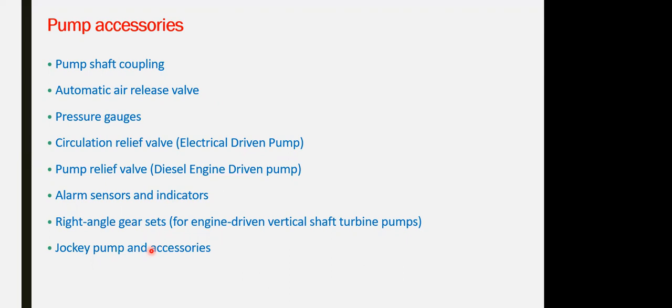All of the tests for this equipment should be submitted when you are uploading for the inspection of civil defense, not as part of the design DC2 submission. It is part of your as-built submission for the civil defense. You have to maintain a copy of the test reports and the QCD certificates for all the equipment in the sample room when they are coming for inspection.